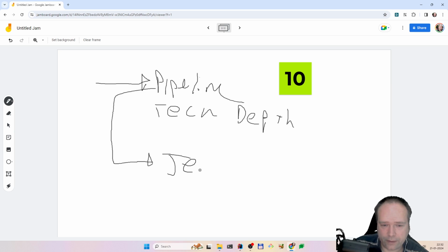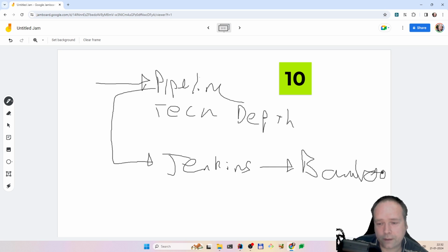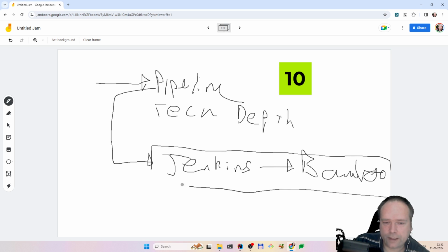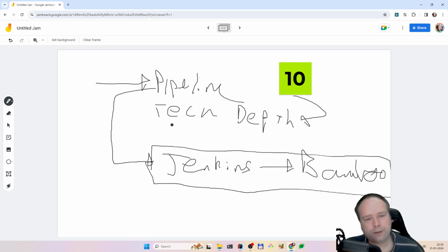That could be a problem. Maybe that could be the solution, because we know that all the other teams are using Bamboo now, and they do not have the same problem like we have. It could also be the other way around, of course. It's just an example. And then if everybody agrees on that after 1 or 2 minutes, then you just continue, and then you take the next problem. And then after 10, maximum 15 minutes, then stop. It should be time boxed, and it should not take too long, because it will tire the developers.